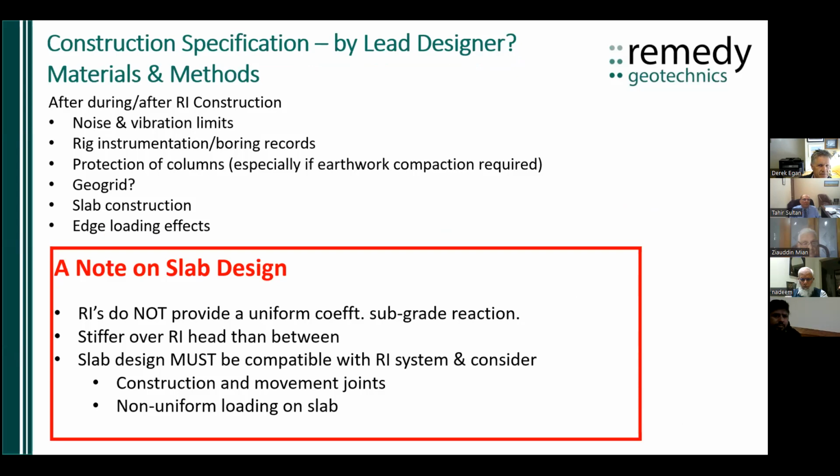So the other thing that I think the lead designer should be doing is determining if there are any other constraints on materials and methods. Methods, thinking of noise, vibration limits. What instrumentation of the rig should there be?